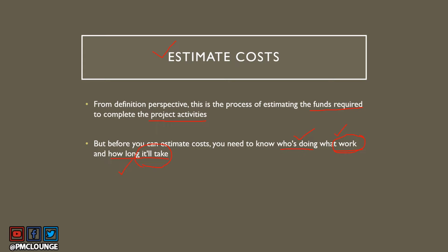Based on that, and based on the charges of business analysts, right, based on what they charge, their fees, is how you can estimate the cost for this activity of completing the requirements documentation. So that is the reason why you should be very clear in terms of scope and in terms of schedule before coming to the estimate costs process.